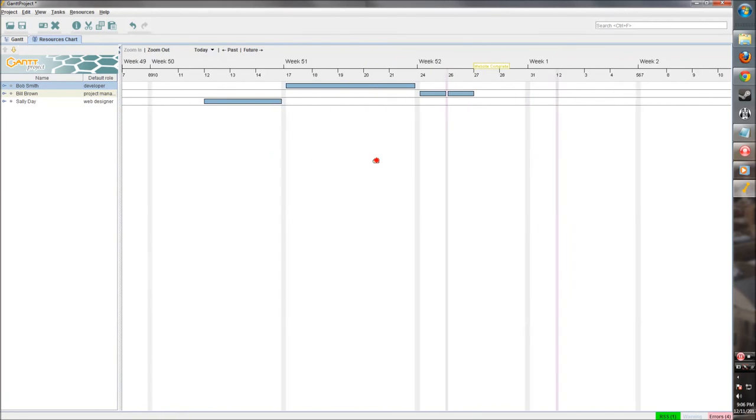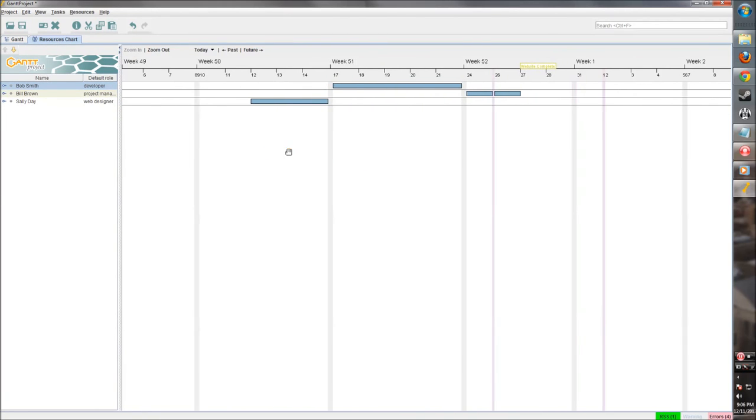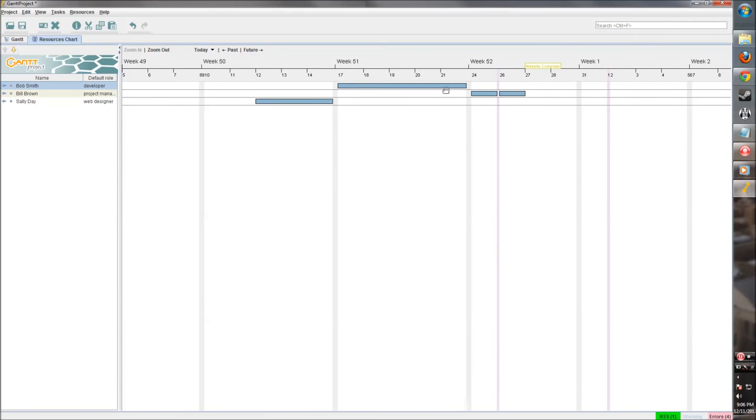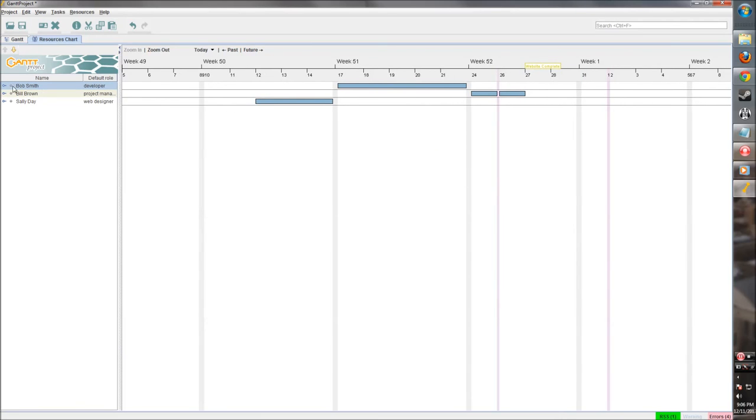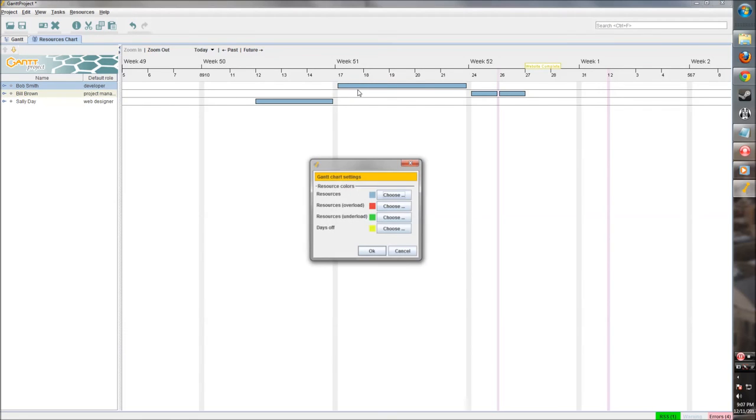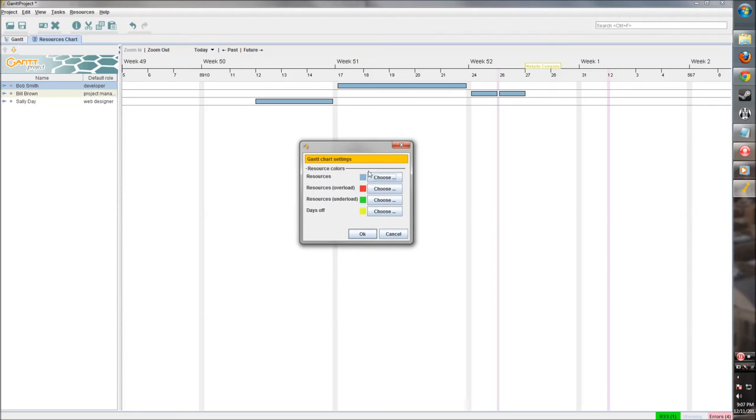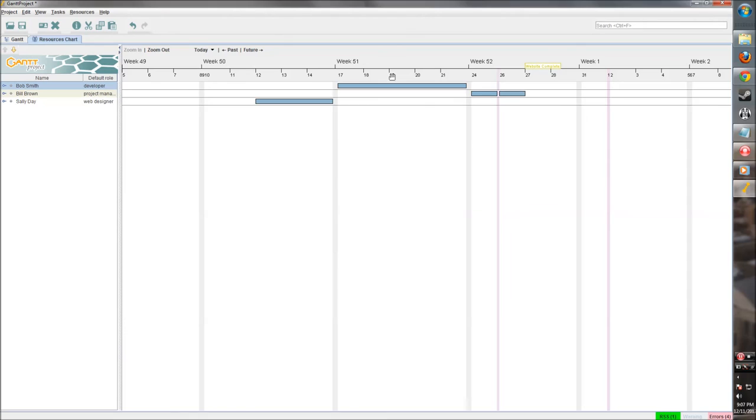So now we have people working on our tasks. We go in here and we can see who's doing what at each particular time. You can see across here, Bob's stuff is on the top. We can display things with different colors, show their days off. If they're overloaded it'll show in red, if they're underloaded it'll show in green, if they're laid out perfectly it'll show in blue. So we've laid it out good here.